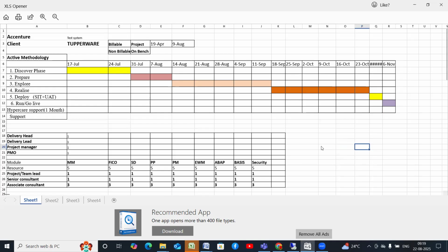And then you will drop a mail to the client saying that as we discussed in our call, these are the below MOM points. Please let us know if we have missed anything and you want us to add it. Then the client will go through that and somebody from their team will respond that it looks good, but I think we are missing this point. Please add it and share it back. Then we will add that and share it back with them. And then they will confirm. So that is how one call is confirmed.